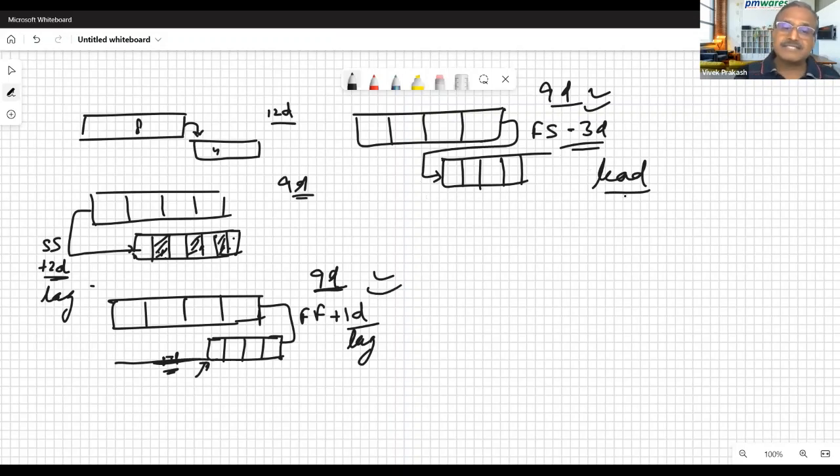When we advance the successor, it will become lead. When we delay the successor, we call it lag. Why do we do so? Because of making the project more efficient, reflecting ground realities, making the project plan, project schedule more realistic.